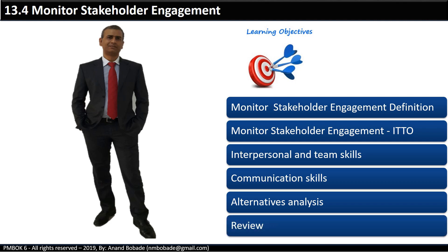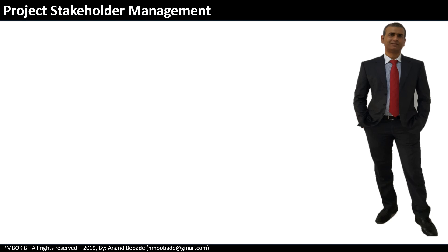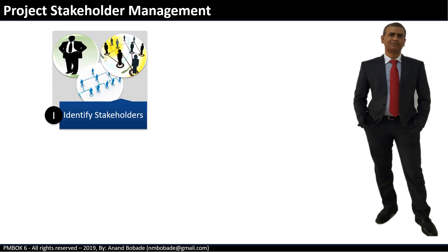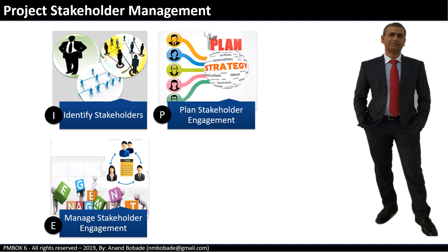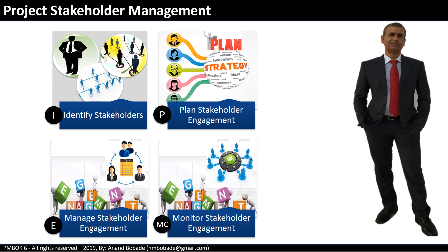Let's start with a quick look at the four processes under the Project Stakeholder Management knowledge area. The first process is Identify Stakeholders under the Initiating process group, where all stakeholders are identified. Next is Plan Stakeholder Engagement under the Planning process group, where we develop the stakeholder engagement plan. The previous process we learned was Manage Stakeholder Engagement under the Executing process group — this is action-oriented, where you talk to stakeholders and foster relationships. The last process is Monitor Stakeholder Engagement under the Monitoring and Controlling process group.